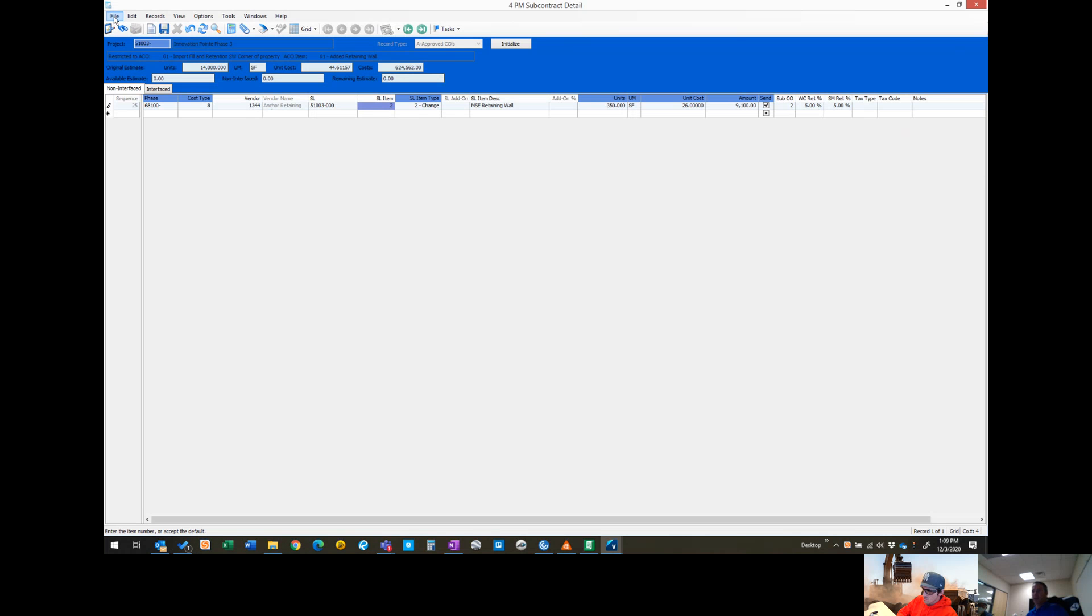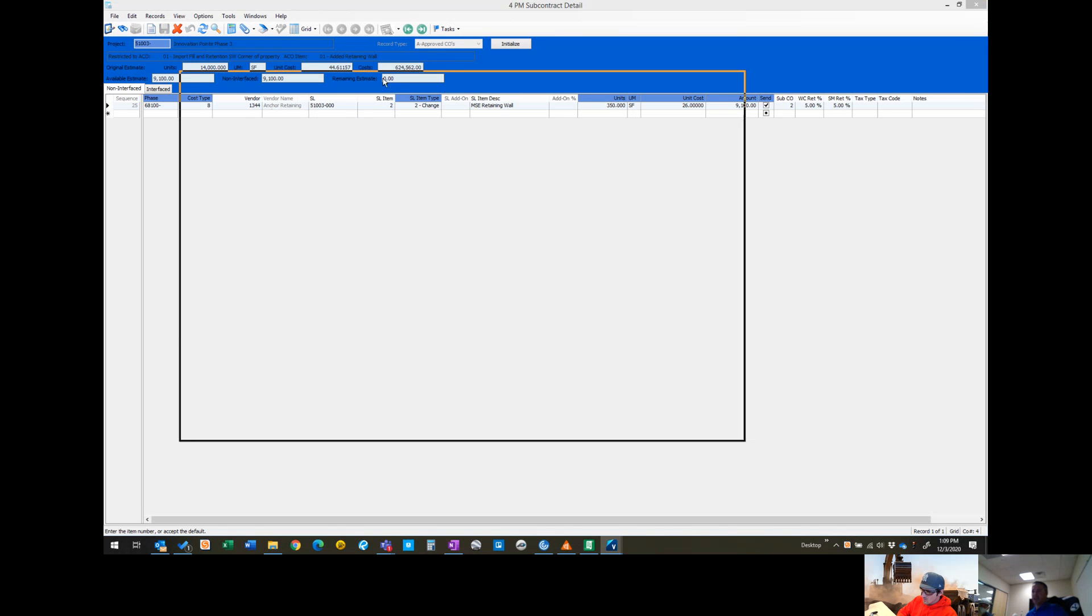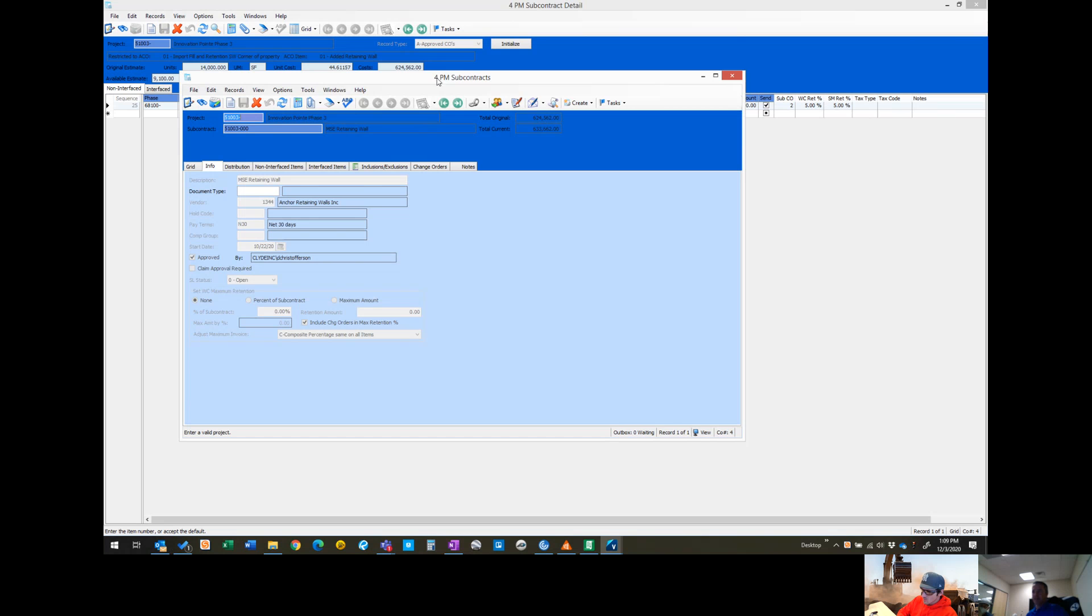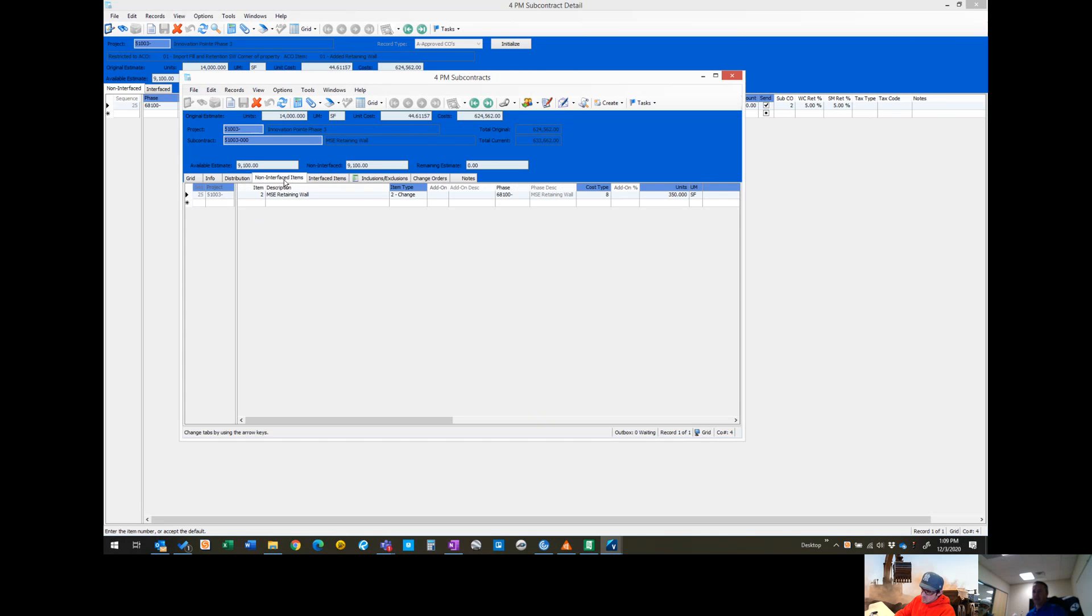From the file menu, we can open up our SL header form. The SL header changed the name to PM subcontracts. It will pull up anchor walls MSE retaining wall contract. Click on interface and it will show us what's already interfaced. Non-interface will pull up and show us this change order that we just entered.